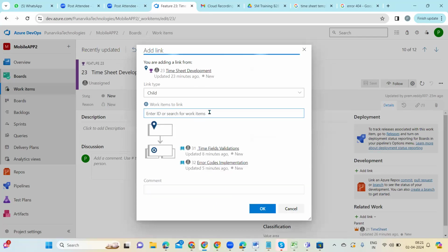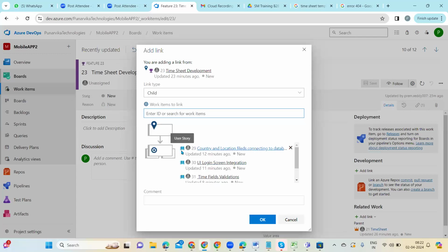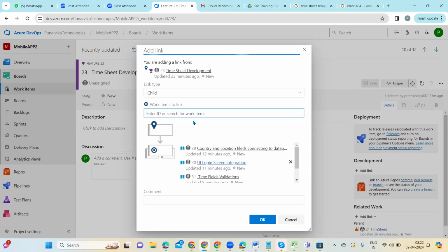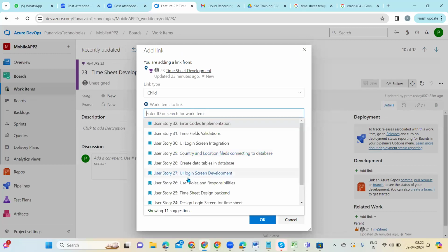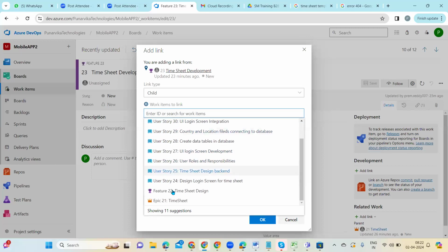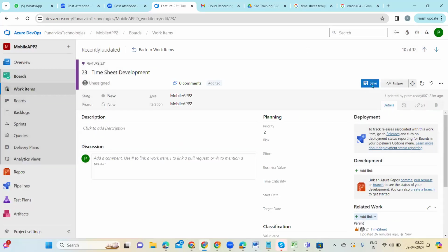So if this is not done, what we should do? If this linking is not done, it is one of the checklist items of Definition of Ready. This is also part of prioritization. So this can be done while creating, or else in backlog refinement.